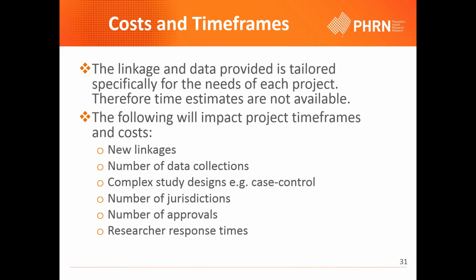And then when you're thinking about timeframes, at the outset, please remember that applying for linked data for your clinical trial involves a number of application and approval processes. This in itself is time-intensive work. So keep in mind that you've got to apply for the data custodian approval, so you have to go through an application process there. You need to apply to ethics committees and get their approvals, and there may be research governance review, specific assessments as well.